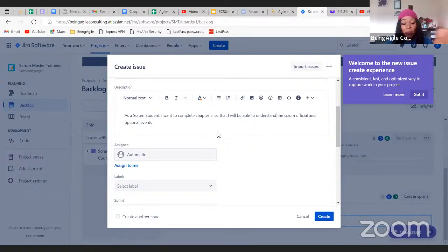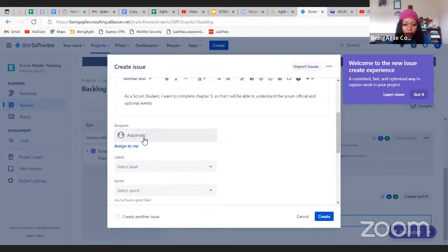The PO should make sure the backlog is ready. All the user stories are in there already, crafted and everything, before the backlog refinement session. In the backlog refinement session, teams should only be adding things that were newly discovered, removing things, adjusting, and what should really be happening is discussing the items that the product owner has brought from the product backlog. That's really how it should be if you're doing it right.